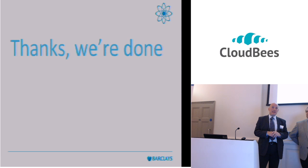And to be honest, nobody's actually set aside any time in their project plans to do any of the migration to the tooling. So this has been done as an add-on to projects, and projects are fitting it in around their normal delivery cycles.